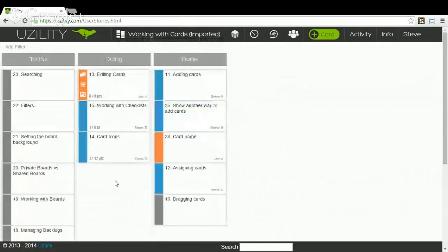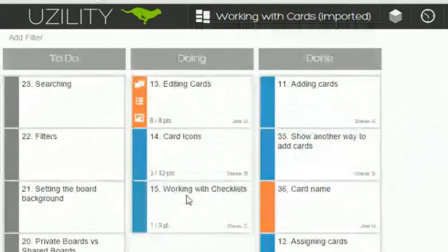So now when we go back to the list here, we can see that the top card was estimated at 8 points, and the column total going down so far is at 8 points. Now we go to the next one, and it's estimated at 3. Let's see here, refresh that. So 3, and the column total at that point is 11 points. And then the last one is 1, and the column total is 12 points. So the column total is just the total of all the points from the top down.